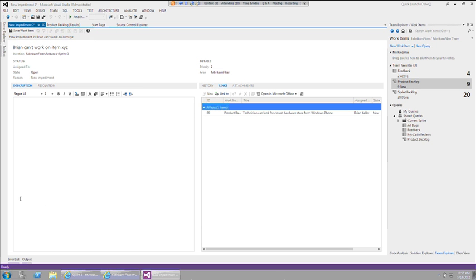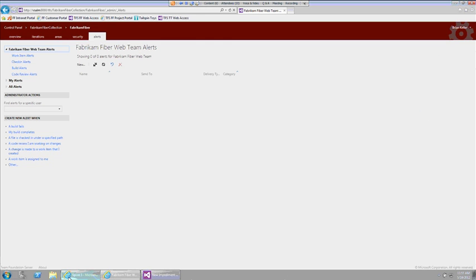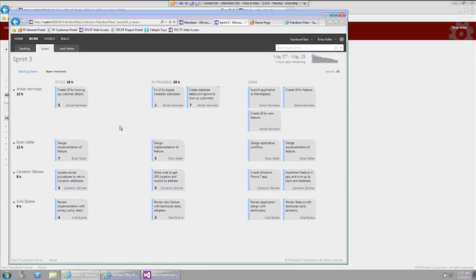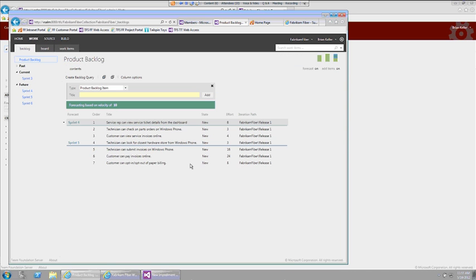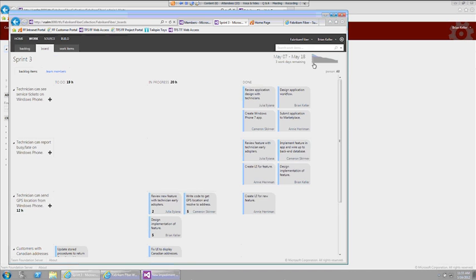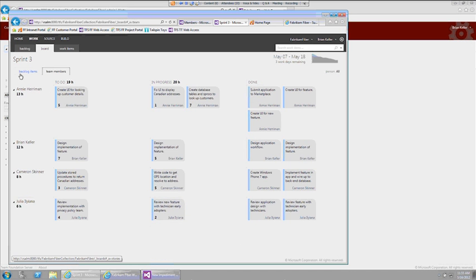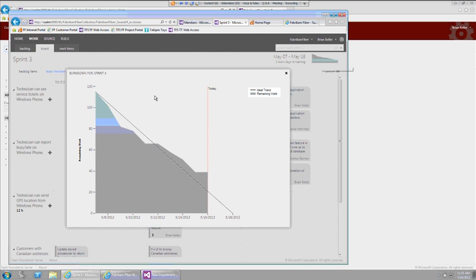Again, if I'm doing the sprint review, the best view would be the one that shows either the dashboard or the backlog view, right? Now, notice that in this particular one, I can either take a look, as I said, at the backlog items or the team member overview. And if I want to talk about how fast we are going, the Burndown Chart is available at all times very easily. In this case here, this team is on an ideal trend to finish on the 18th, but you notice that they are a bit late in delivering.